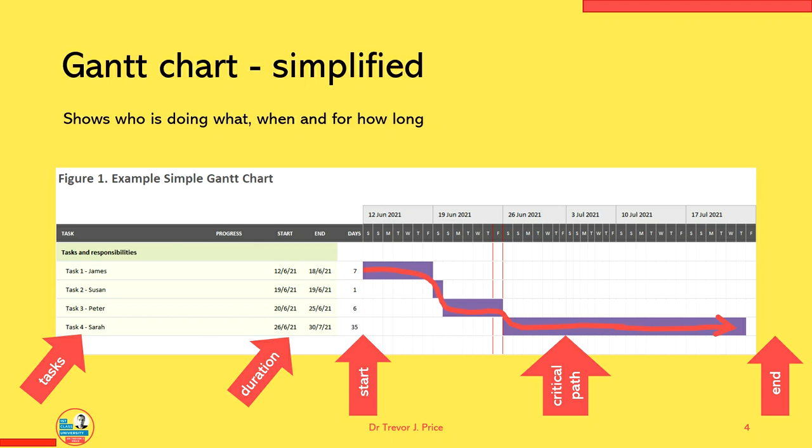So to identify that critical path, especially if you've got a more complex project with more tasks, some tasks might be able to run simultaneously, whereas in this simplified diagram I've just shown them all linear, so they're all on the critical path. You have to finish one before doing the next. That has to be completed before moving on to the next one, and so on and so forth through the project. Hopefully that's given you a bird's eye view through using a Gantt chart.